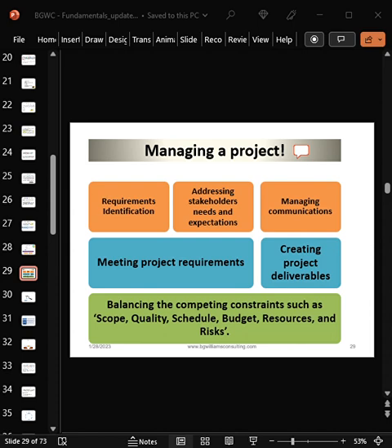So, it can be in form of performing an analysis, either you want to quantify it to see the impact. So, for instance, in the area of scoping, if they are bringing more additional work or more requirements on board, you must check the impact it will have on other constraints before you agree.